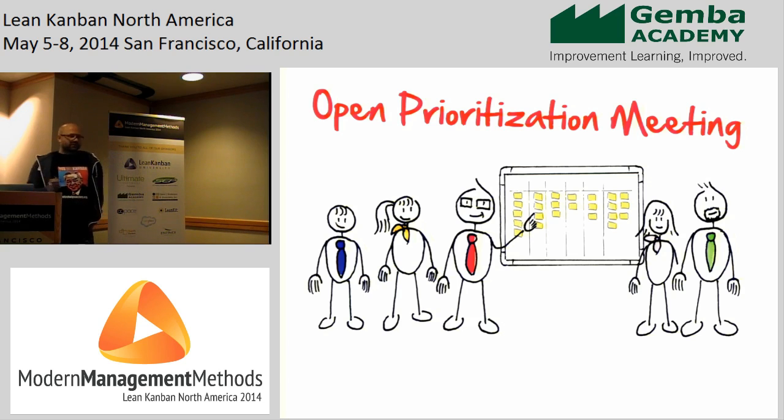So this worked really well. We got rid of this to-do column for external requests. They still have a small backlog for their own roadmap, but all the work that they do for other teams is really in this temporary backlog, and then it's closed again.